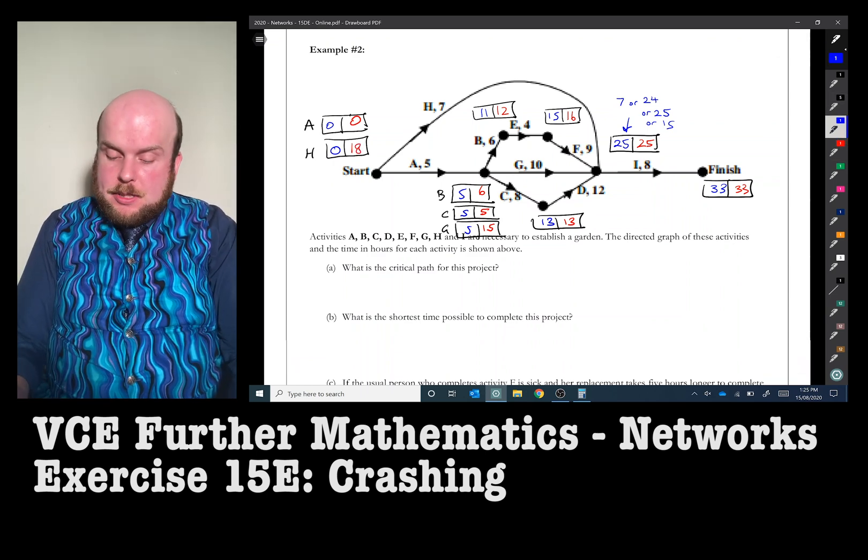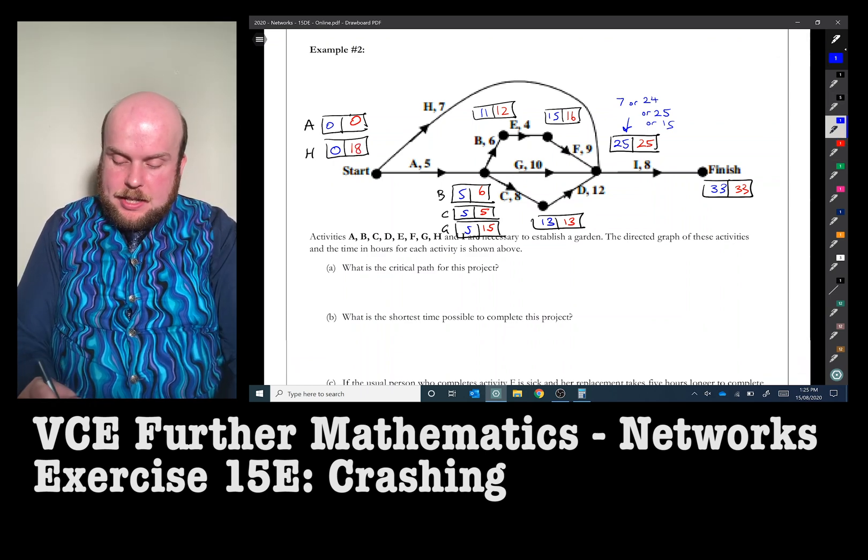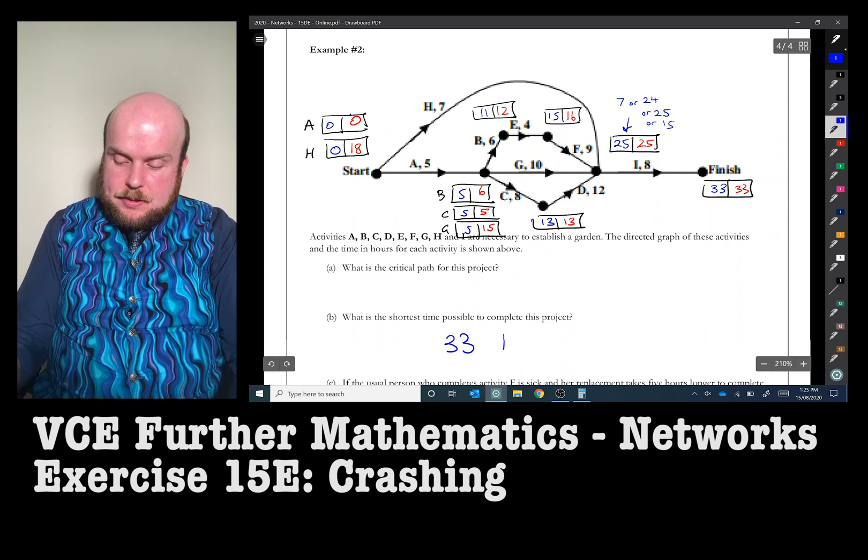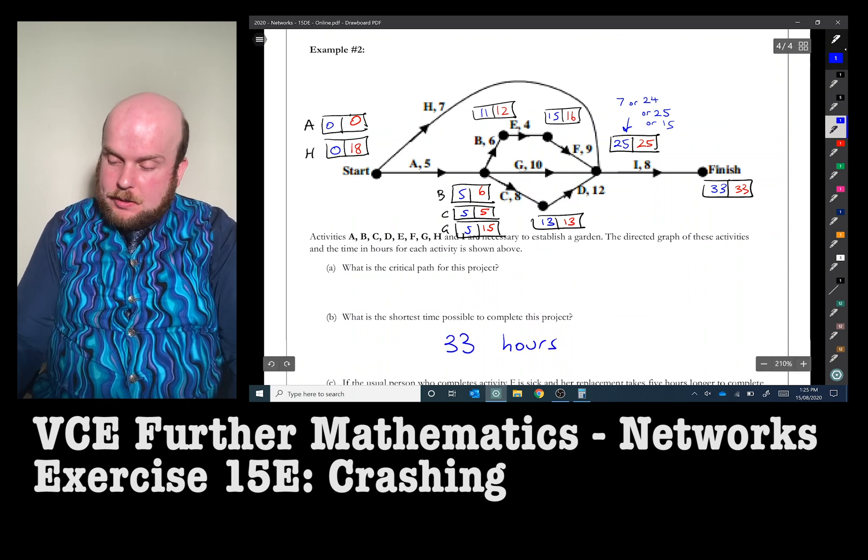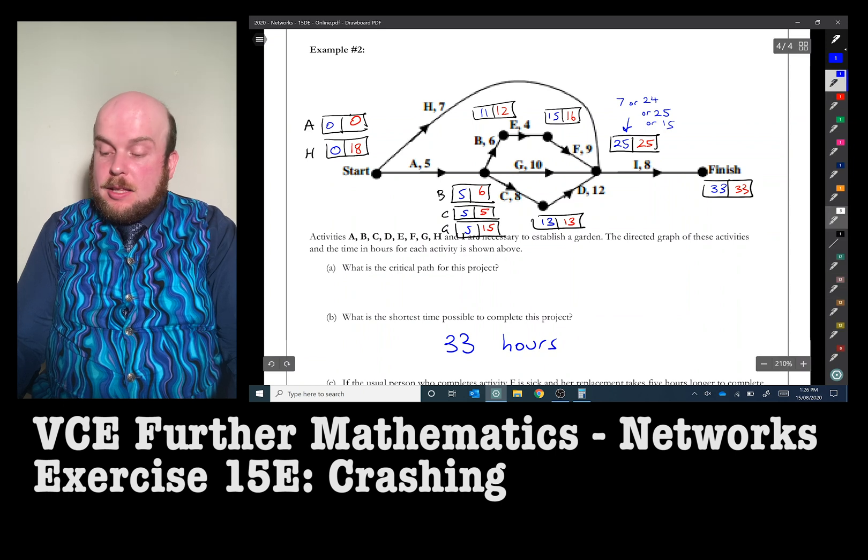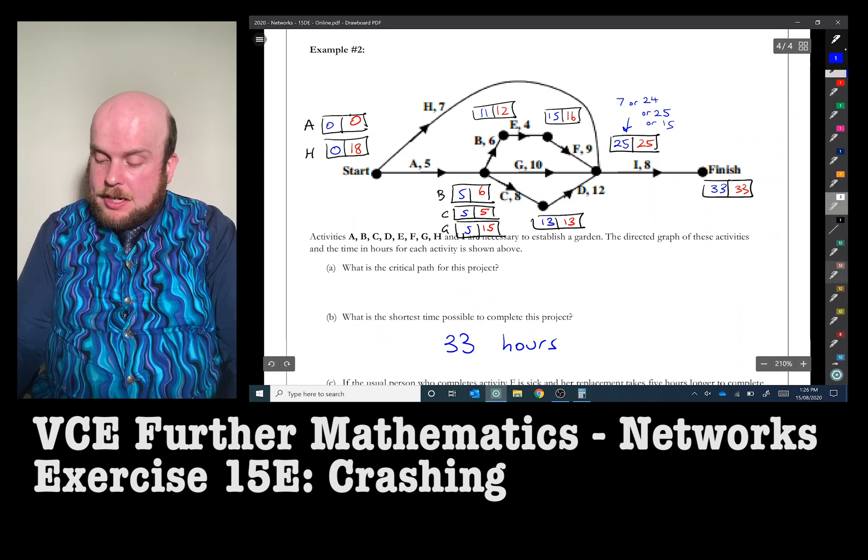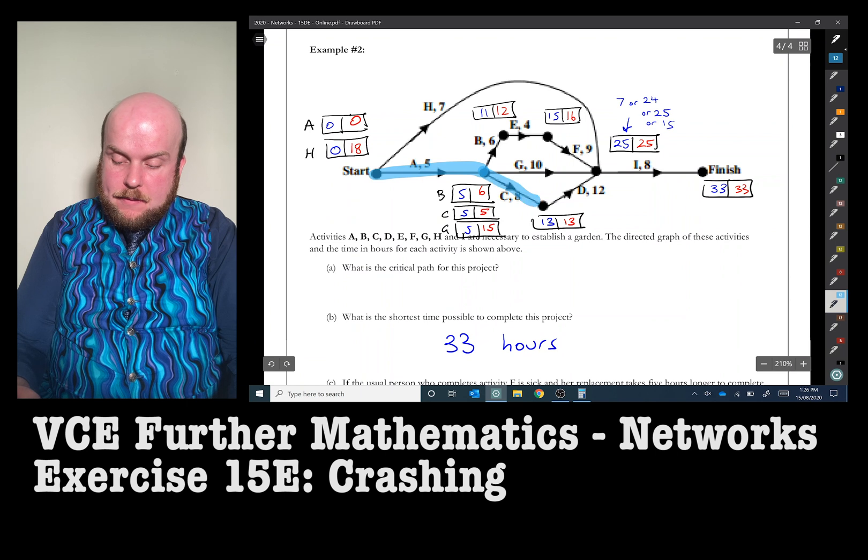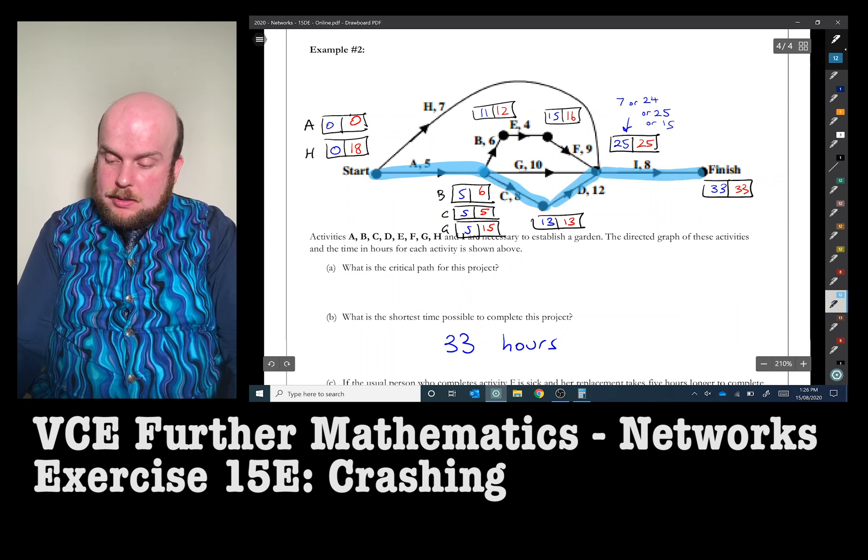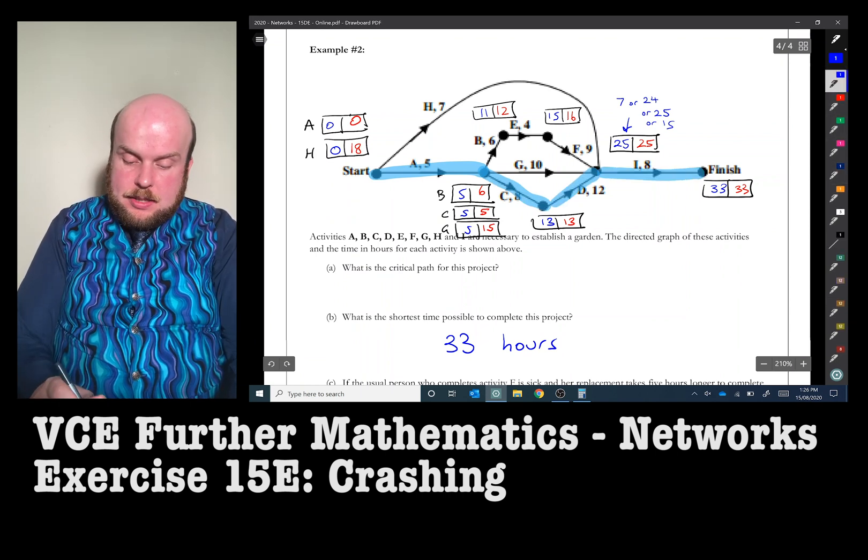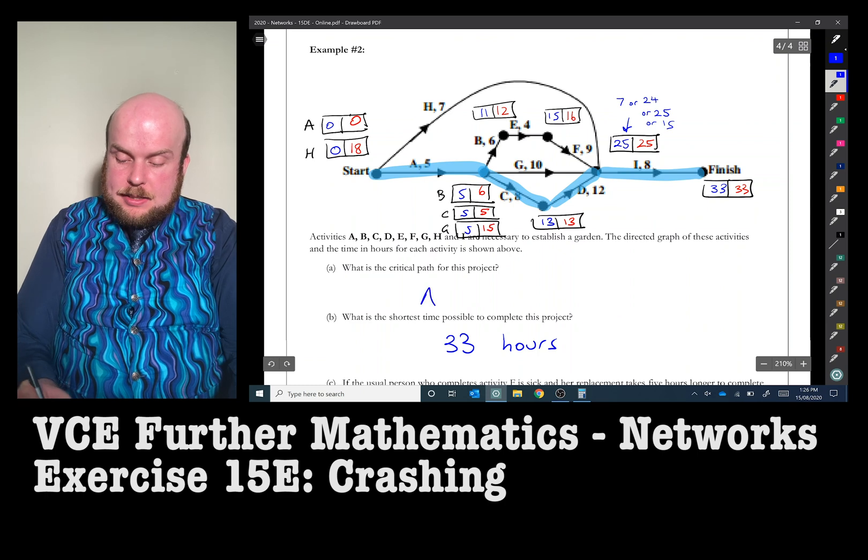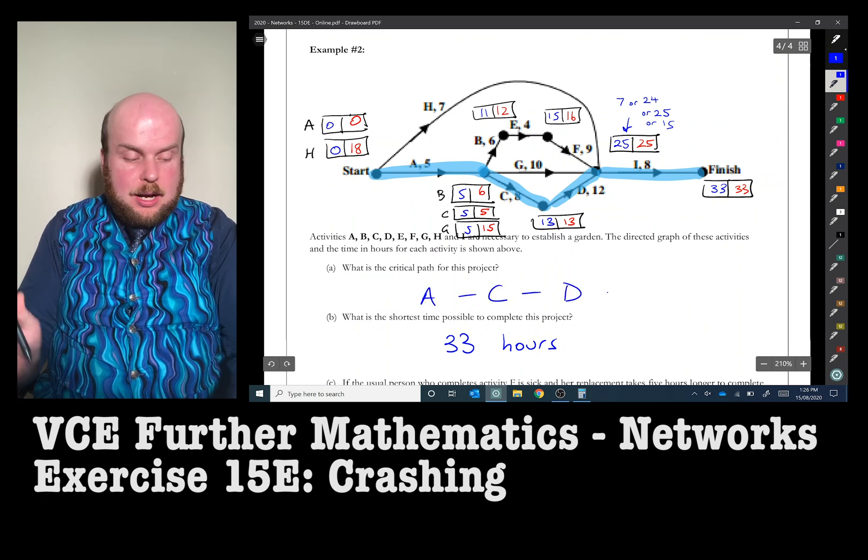So I've done my forwards and backwards scanning. I can see that it will take 33 hours, and so the critical path will be the ones with the latest starting time and the earliest starting time being the same value. Therefore, this is our critical path: A to C to D to I.